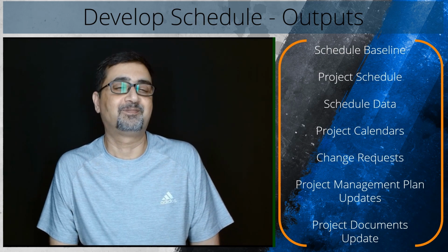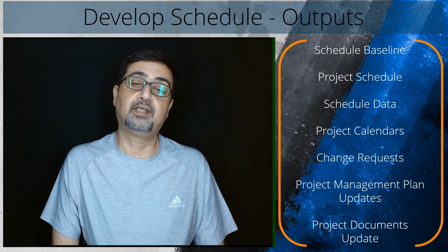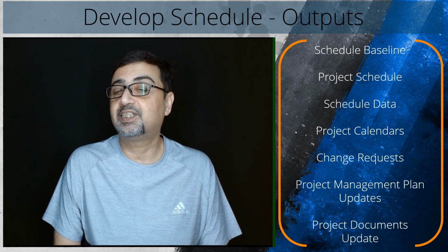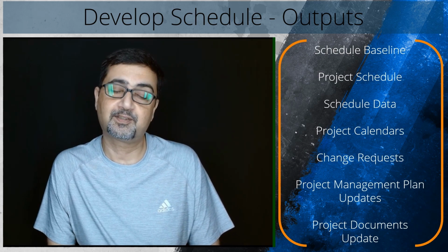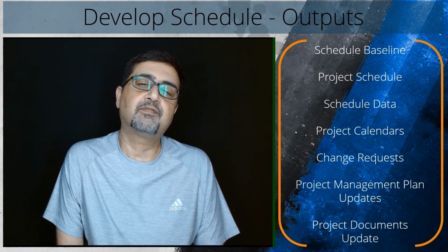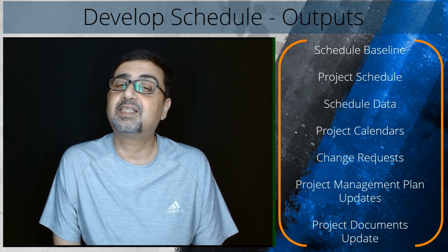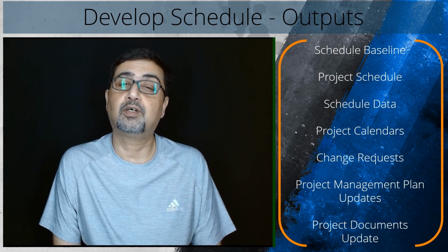Cost baseline. Changes to the cost baseline are incorporated in response to approved changes in scope, resources, or cost estimates. In some cases, cost variances can be so severe that a revised cost baseline is required to provide a realistic basis for performance measurement.